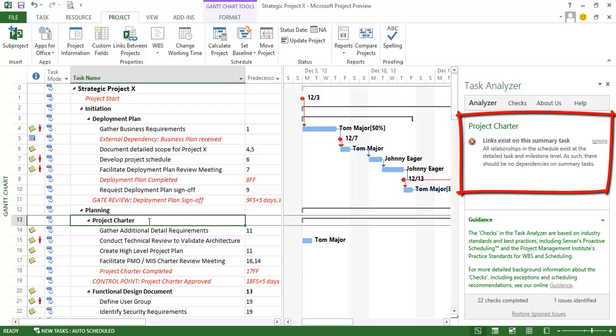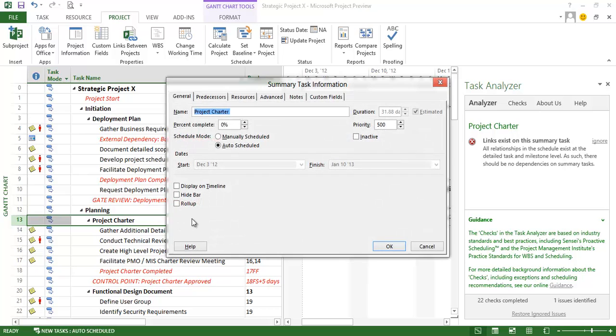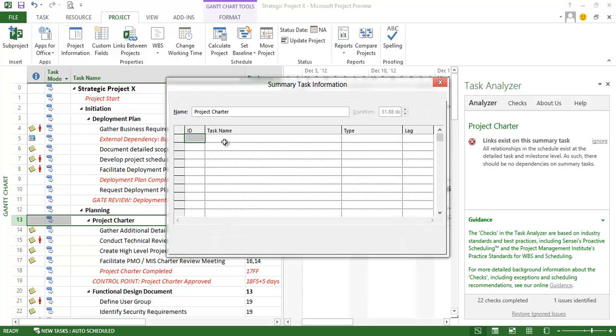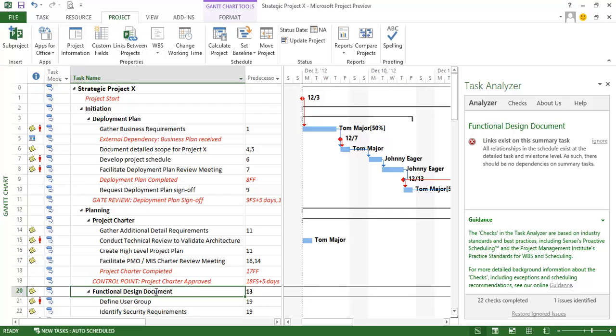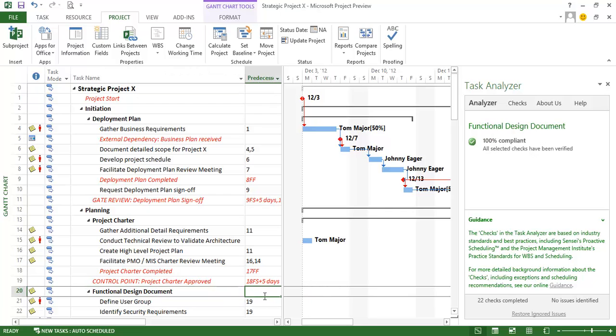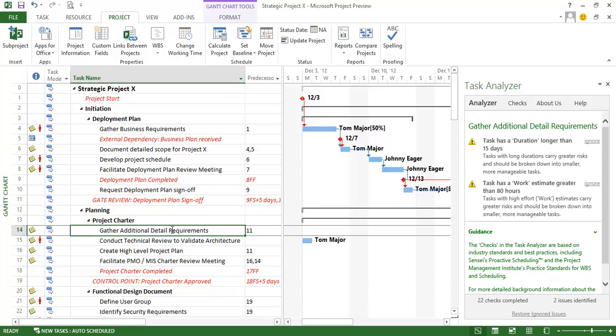It looks like this next one here I have a link and we shouldn't be linking at summary tasks. We want to make sure that all the relationships that exist are documented at the detailed task and milestone level. So I've got to get rid of this particular link right here. And let me just look at... There's actually no predecessor on this one. It's linked to this one right here. I'm just going to delete the link in the predecessor column. And now that task is in compliance as well.